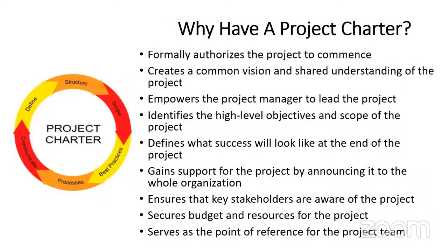So why then do we have a project charter? Why do we need a project charter for a project? Number one, it formally authorizes the project to commence. Now, if you commence a project without a project charter, there has been some legal perception that a project charter can be written or unwritten. It can be written or it can be verbal, but by whatsoever means, there is a point where that relationship is created, and the project sponsor tells the project manager, you can go ahead. So whether it is written or verbal, the project charter is what authorizes the project to commence.